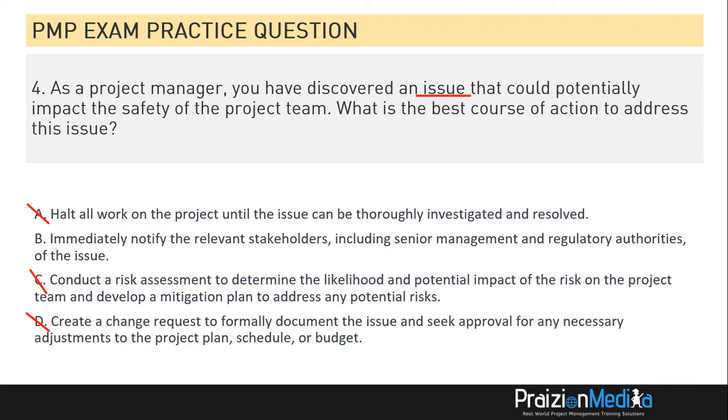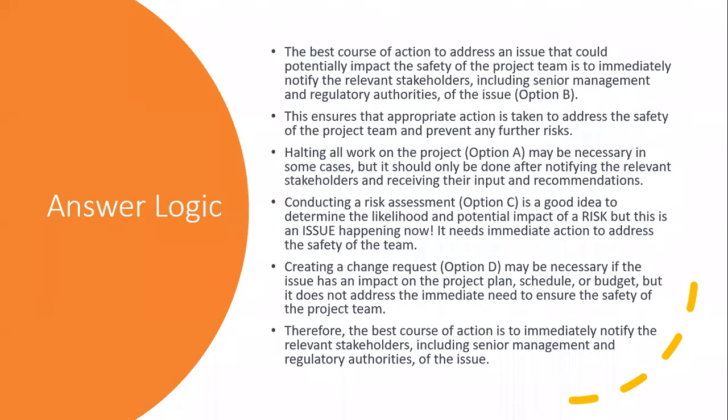Okay. So my friends, here is some further detail about this. Let's clear those markings and let's take a look. And there you have it. The best option is option B. Immediately notify relevant stakeholders. Halting all the work on the project may be necessary in some cases, but it should only be done after notifying relevant stakeholders and receiving their input, recommendations, and so forth.